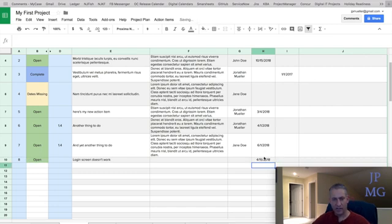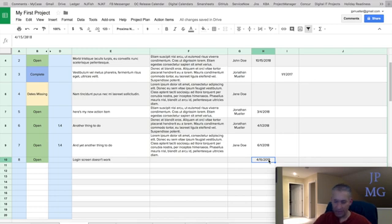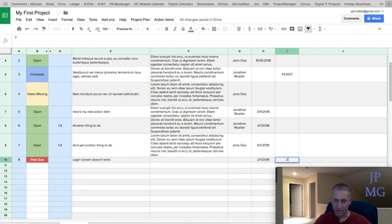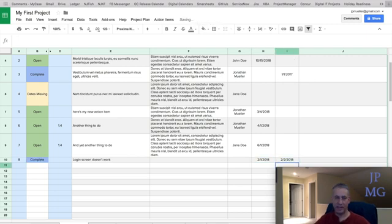So let's say I want this to be complete by 4/15. And as soon as I enter this date, it changed to open. If I happen to enter a date that's before today, it'll tell me it's past due. And as soon as I say it's complete on a day, it'll show as complete.